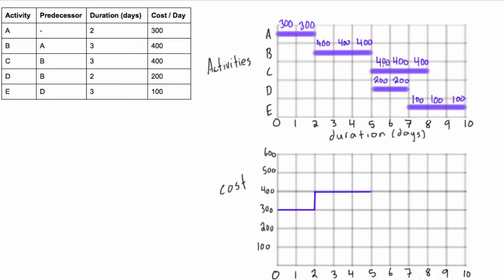Looking at day six here, we have $400 and $200, and same with this one, $400 and $200, so that's a total of $600. So we're going to jump again, jump up to $600 now, and that will be for two days.